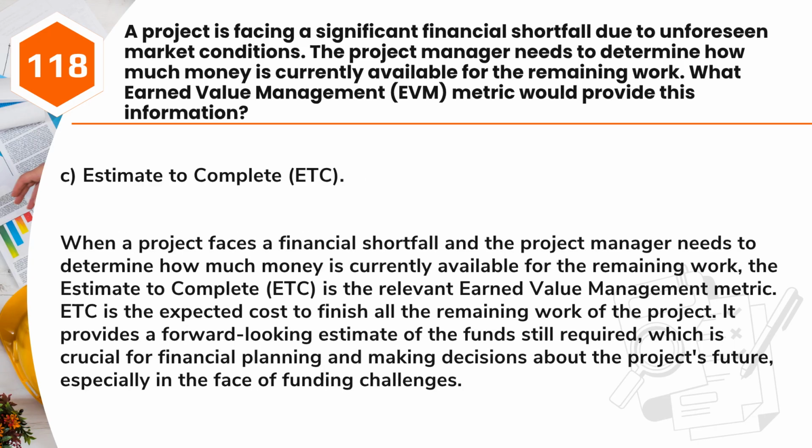Answer: C. Estimate to complete (ETC). When a project faces a financial shortfall and the project manager needs to determine how much money is currently available for the remaining work, the estimate to complete (ETC) is the relevant earned value management metric. ETC is the expected cost to finish all the remaining work of the project.